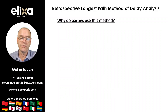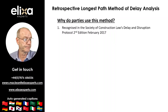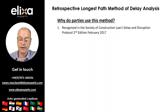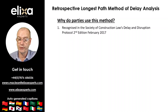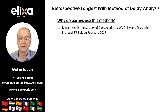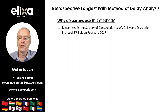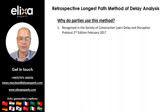So, why do parties use this method of delay analysis? Firstly, it is recognised in the Society of Construction Law's Delay and Disruption Protocol, 2nd edition, February 2017, as a legitimate method of analysis. If the circumstances are appropriate, without switches in the critical path, then it can be a reliable method of delay analysis in dispute resolution.